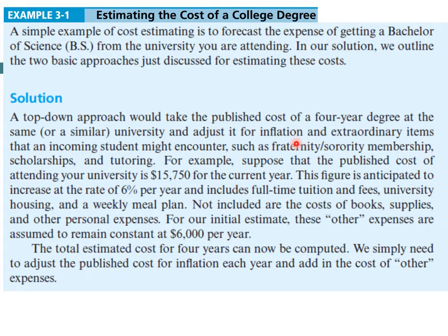Or even if you get the cost for SQU on its website, you may need to adjust it for inflation. What's inflation? Inflation is the general price increase, the level of price increase each year. You may also need to adjust for some extraordinary items that you might encounter as a student. So let's see how we can do this.